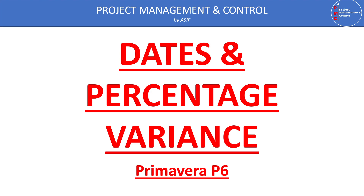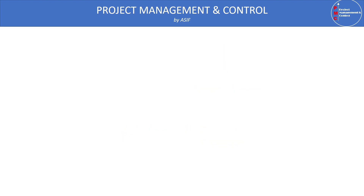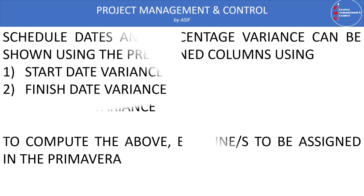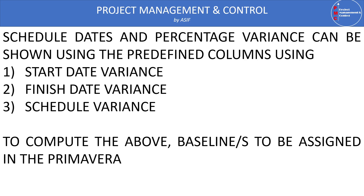Similarly, to assess project health and understand how we are progressing, the overall percentage plays a major role. We can compute the variance between planned and actual percentage using schedule variance. In Primavera P6, dates and schedule variance can be shown using the column tracking tool, where we can display start date variance, finish date variance, or schedule variance. Schedule variance is used to compute planned versus actual performance and percentage in the program.